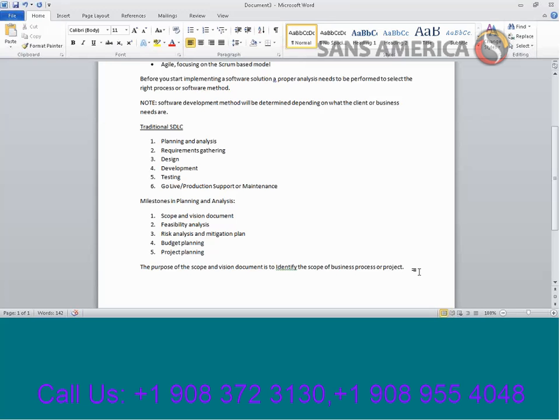Fine, we are going to allow users to transfer funds. But if you are implementing a solution that allows the client to transfer funds only within the same bank, you need to mention very clearly that the scope of this project is funds transfer within the bank, and any external transfers are out of scope.